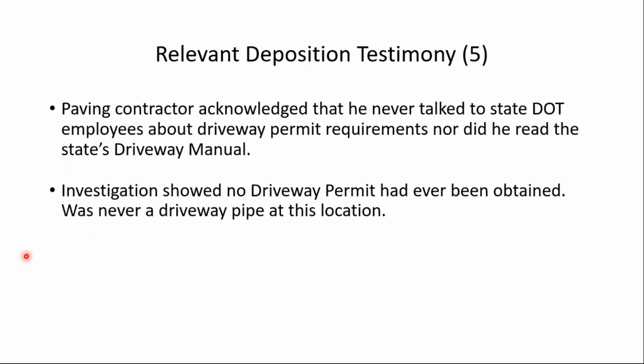Also, the paving contractor acknowledged he never talked to any state DOT employees about the driveway permit requirements, nor did he read the state driveway manual. In fact, discovery showed that no driveway permit had ever been obtained, and there was never a driveway pipe under the driveway at this location, as should have been installed.